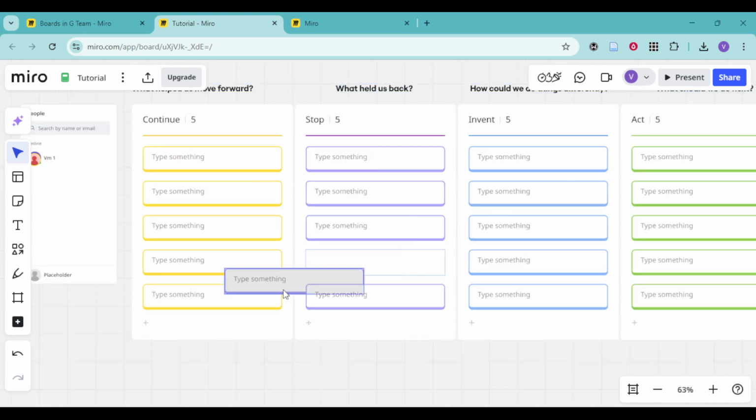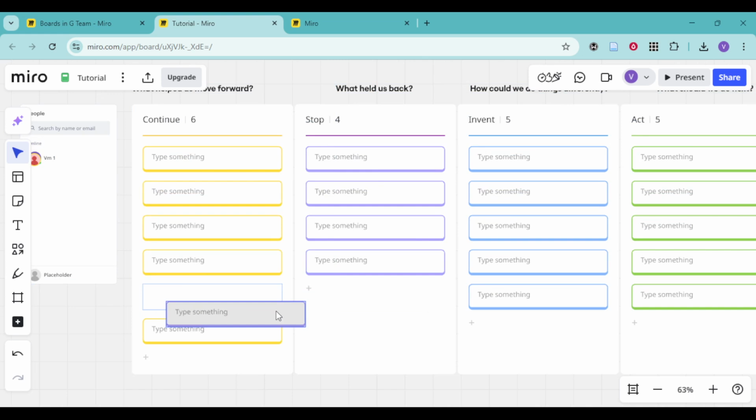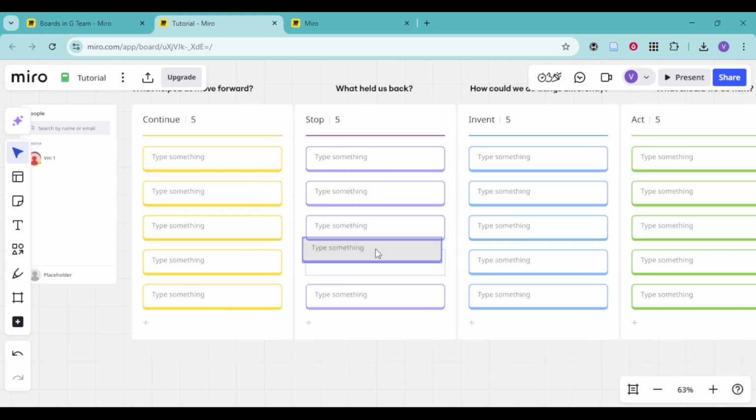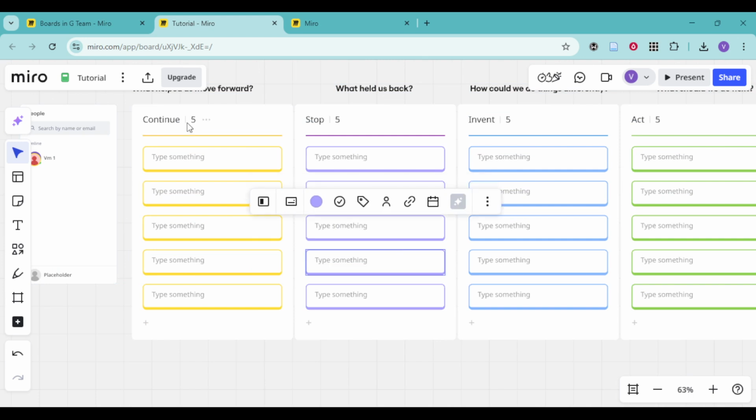Keep each card focused on a single task to avoid confusion, and break down big items into smaller cards to maintain momentum. Collaboration in Miro is real-time, so you'll see teammates' cursors as they update content. Add comments directly on cards to ask questions or share feedback, and mention teammates so they're notified. If your team agrees on simple conventions like how to title cards, what each column means, and when to move a card, the board will remain tidy and trustworthy. A quick daily review helps keep everything current and prevents bottlenecks from going unnoticed.